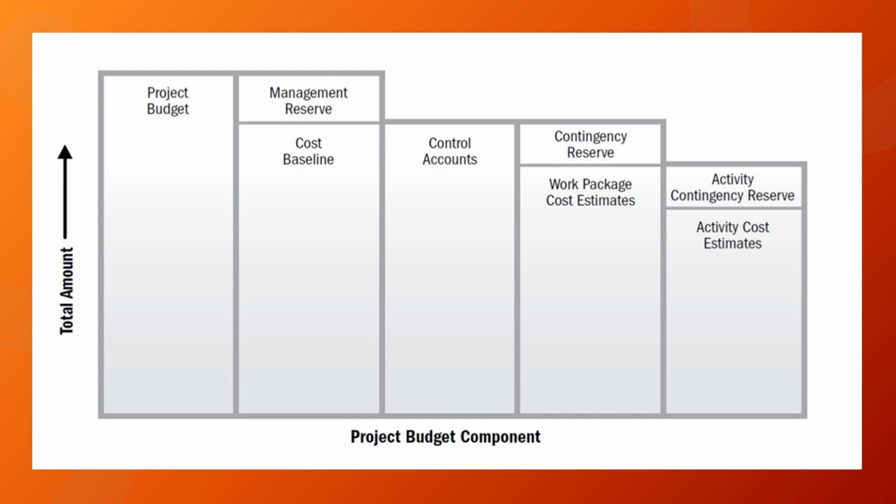The significance of control accounts lies in their ability to bridge the gap between high-level project budgets and detailed task-level costs. They create a hierarchical structure that aligns with the project's work breakdown structure, allowing project managers to oversee costs at both the macro and micro levels. Control accounts enhance transparency, accountability, and effective cost management throughout the project's lifecycle.